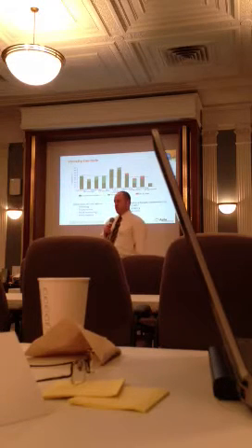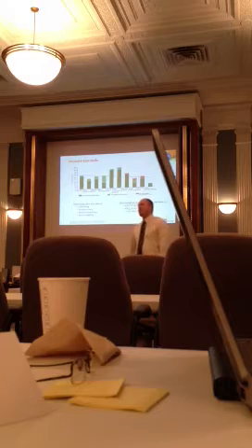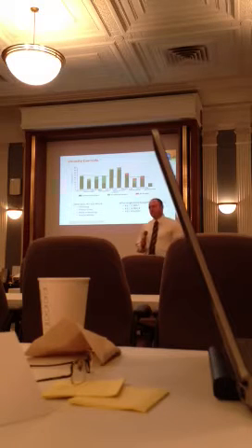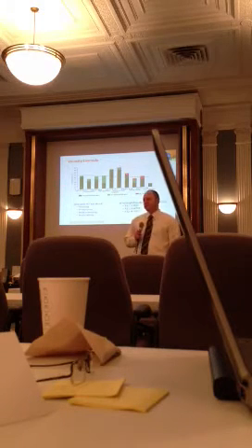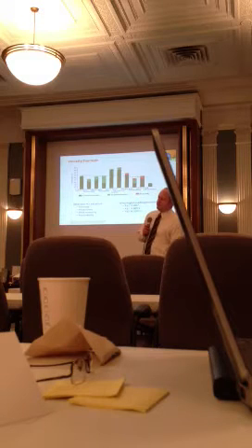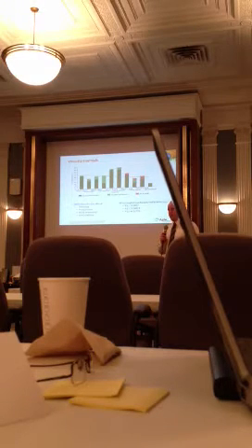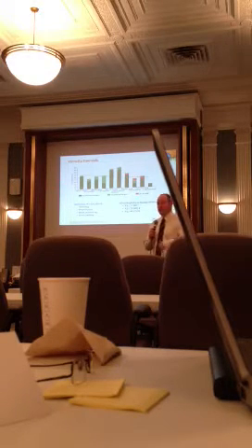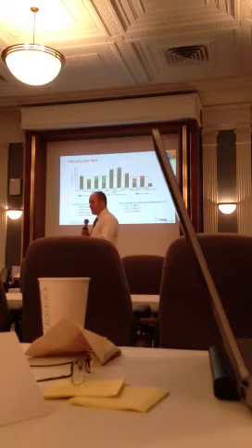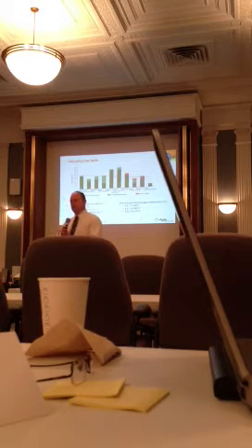Yeah, I mean, that's kind of known variability, because even though you develop most of them, they're like, you know what, this is great, but we're going to accept half because we have changes for the other half. So that's just gaining experience over time with your users, right? Yeah. The other thing that can really impact this is defects that may come up, right? You think you're going to get this done, all of a sudden a defect comes up, and you can't get acceptance on it, and it causes carryover, right?